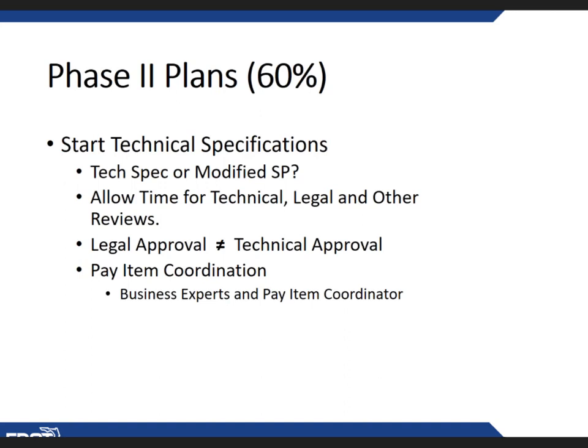I've seen the drainage office get a request to use an innovative product that's been researched recently, but we don't have long-term results on how well it will perform. So, okay, we want to try it on 2 or 3 projects. We don't want to try it on 30 or 40 projects. In those cases, we want to evaluate which projects are best candidates for this new product. And just because you used it on your last project is not justification for using it on your next project.